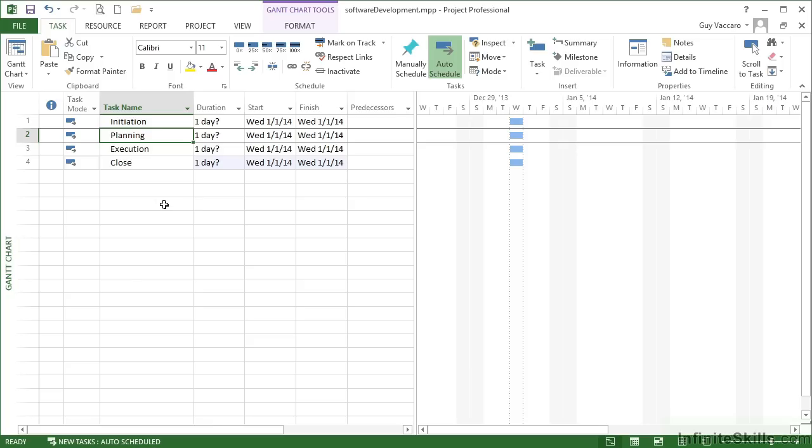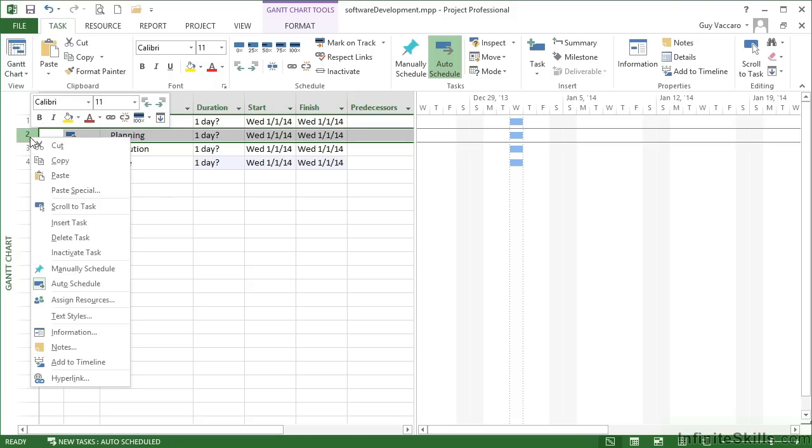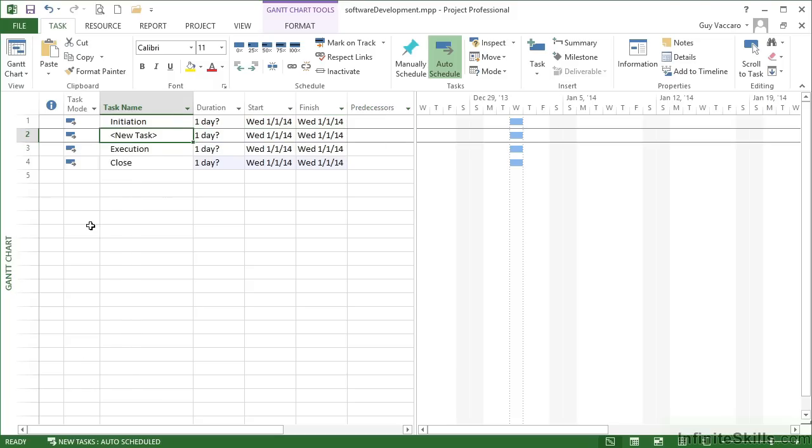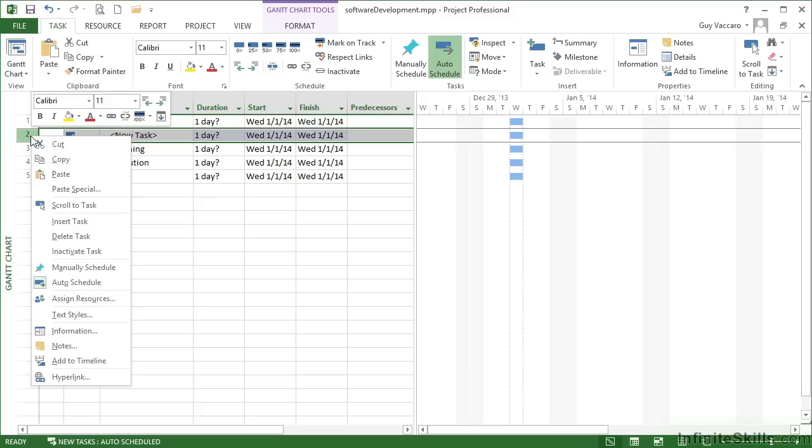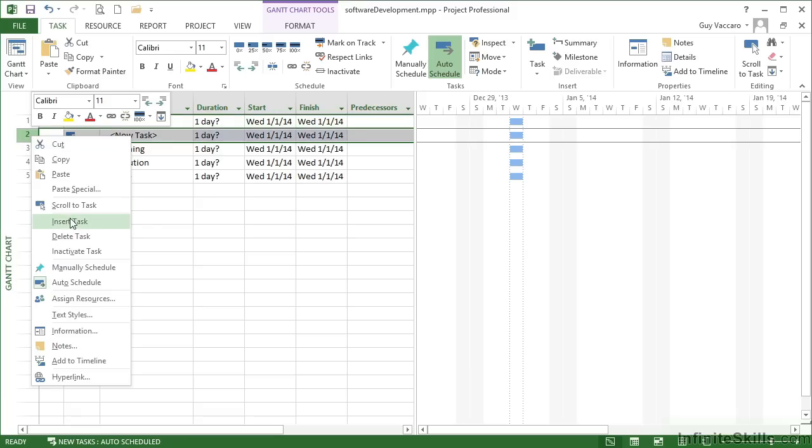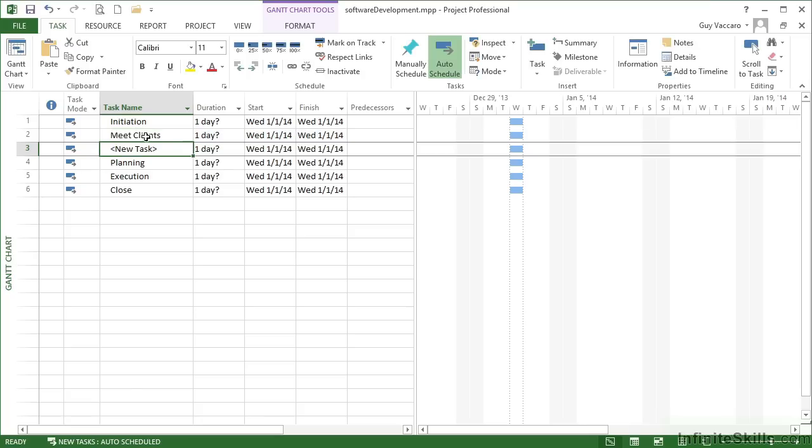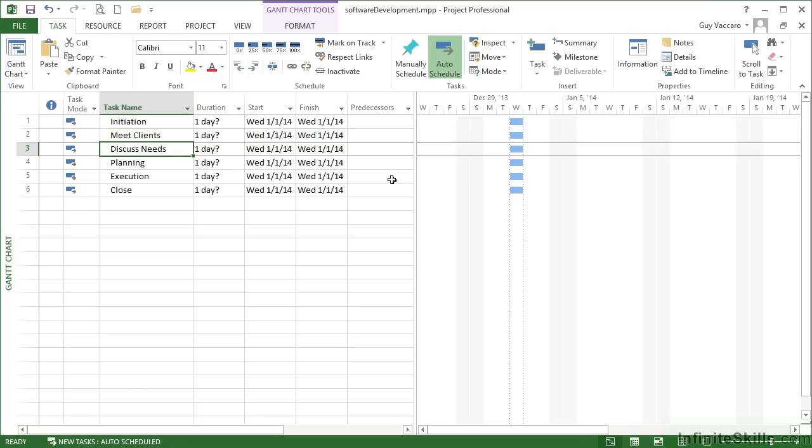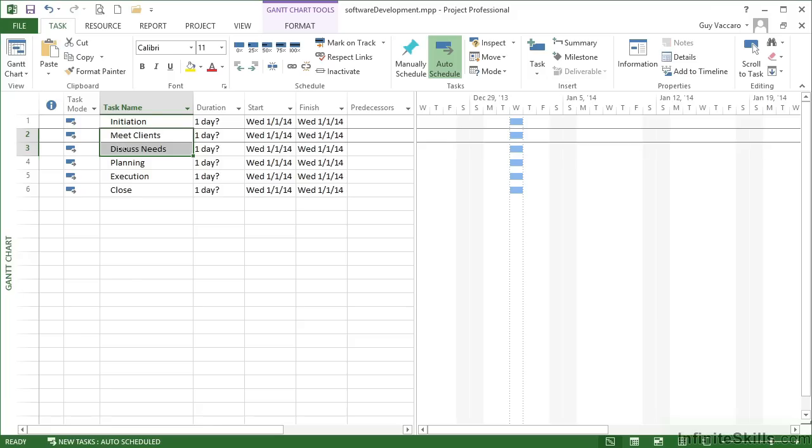I can do that in a number of ways. I can press insert on the keyboard, I can right click here and choose insert task. I know there are two, so I might as well insert two, and then I simply type: meet clients and discuss needs. At the moment, these two sections are actually on a par with initiation and really they want to be subsets. So these two want to be sections within this phase. So I highlight both rows.